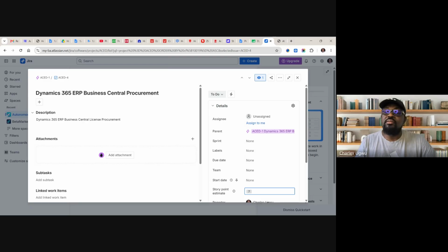You and your team, the way to get a story point is during the planning or during the refinement, everybody needs to vote on the capacity or the complexity of this particular work, how long or how easy. We call it the effort, the amount of effort involved in deploying this particular feature.